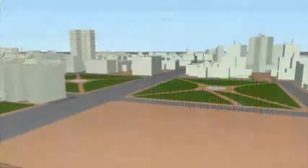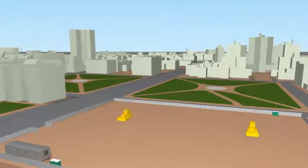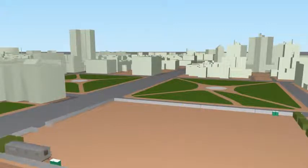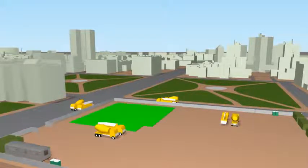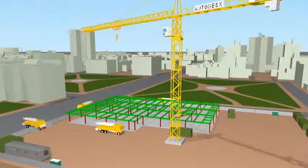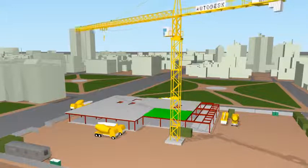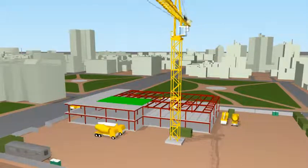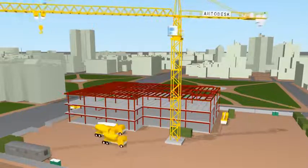This type of analysis can be further augmented to include logistic simulations, creating mock-up scenarios of construction sites to assist in planning and visualizing areas of potential risk. For example, finding optimum positions for site cranes and ensuring adequate clearance with surrounding buildings, topography or temporary structures such as scaffolding. Using the schedule to identify where materials will be delivered to site and where they can be staged whilst maintaining relevant access routes. The simulations can also be used to communicate temporary road closures, diversions and so on, in order to gain local government approvals or public acceptance.